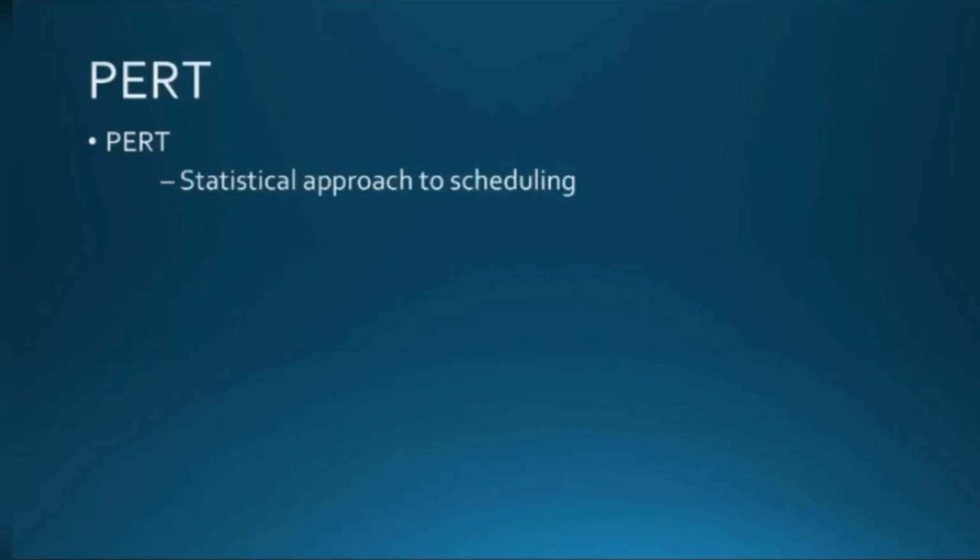So that method is PERT, which is essentially used for unknown, uncertain situations, when the project is being executed for the very first time, when you don't have any previous record of the activities or the durations, when it is very newly done, surrounded by a lot of uncertainty. In such cases, this is one of the most suitable and efficient methods for scheduling.